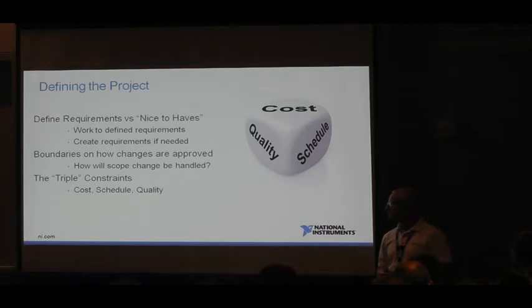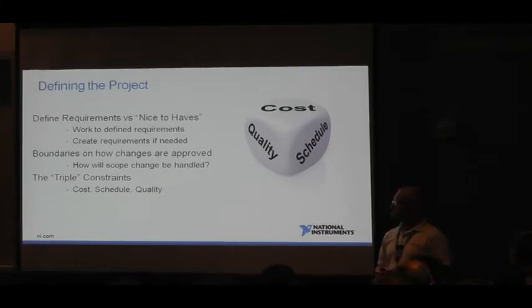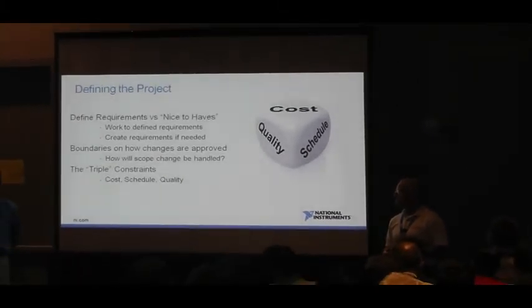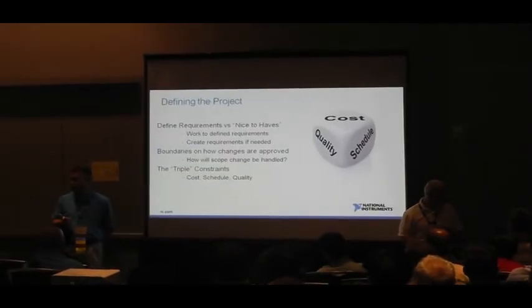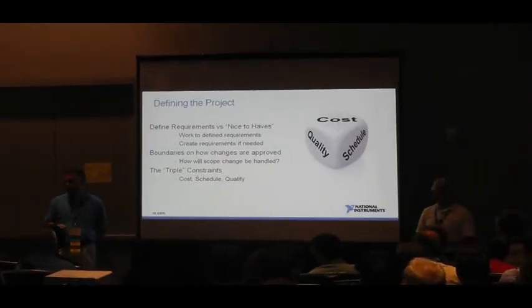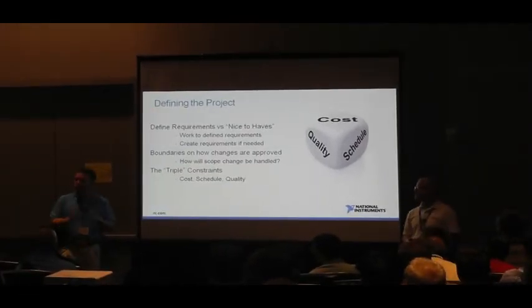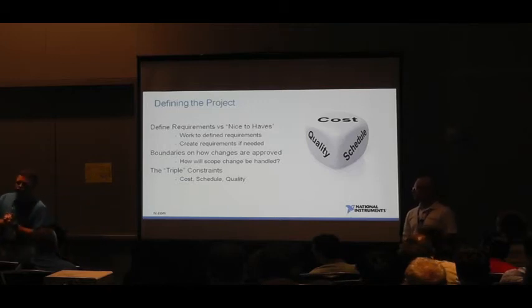Well, and oftentimes, if the requirements are not well defined, it's hard to do a fixed price bid on that. So you're talking fixed price mostly here. It can go either way. But in the case of very undefined requirements, a lot of times we say, well, you either need to define your requirements or we need to talk about doing this as time and material.